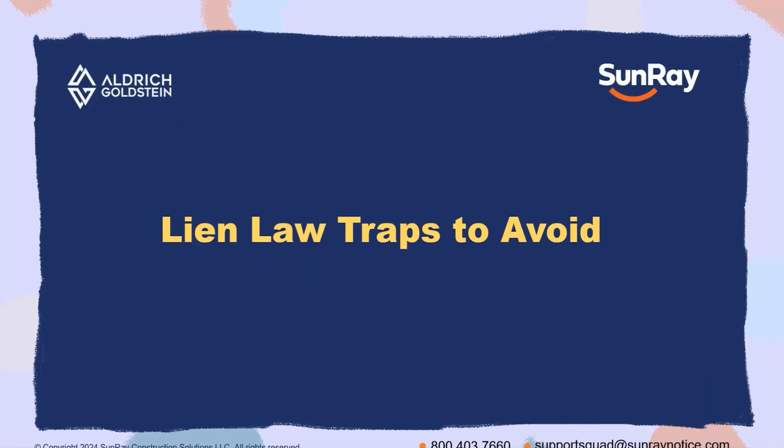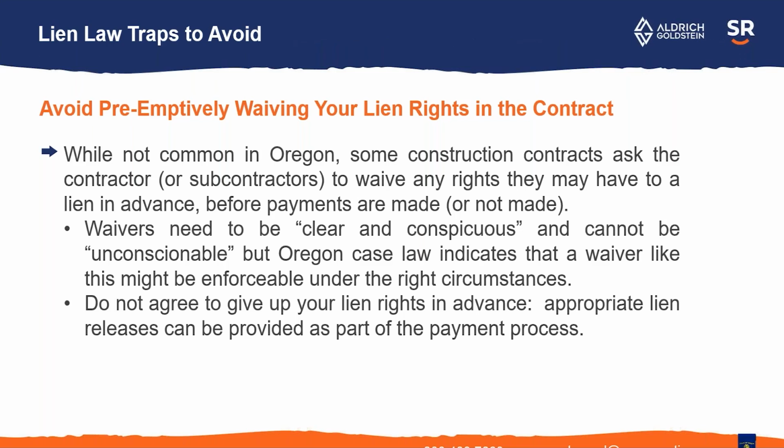Lien law traps to avoid here. I would avoid signing anything that waives your lien rights preemptively. So before you start work, don't waive your lien rights. There are contracts, especially out-of-state contracts, that purport to waive lien rights. It may be enforceable in Oregon, but I would say watch out for any clause like that. The lien laws are there for a reason. If you're not getting paid, you should be able to use them.